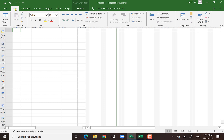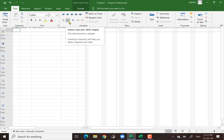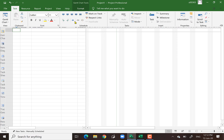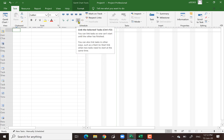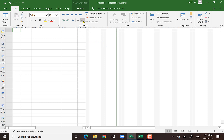Under the Task menu, there are several buttons. There is Indent and Outdent, which is used to organize your project. There is also the Splitter to split a long task. There is a Link button used for predecessor relationships, and Unlink. The link and unlink function is basically for the finish-to-start relationship. We will show more details later.